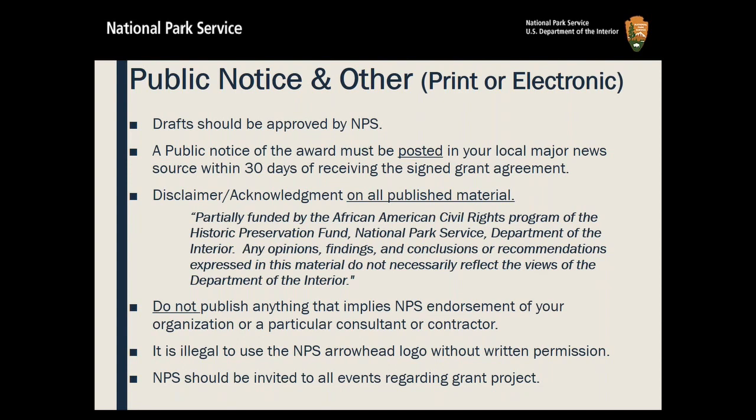If you notice in your grant agreement, we do require that you make a public notice of the award within the first 30 days of receiving the grant. And so hopefully all of you have done that by now, but if not, please work with your grant administrator to get that done. And one thing to note about that is you cannot just put out a press release on the wire.